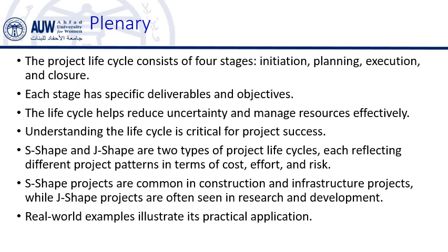Understanding the differences between the S-shape and J-shape life cycle helps project managers decide how to allocate resources, plan the timeline, and manage cost based on the nature of the project. For example, a project manager overseeing the construction of a new office building needs to focus resources on the execution phase, while a project manager overseeing the launch of a new product might expect a high initial investment, a quieter middle phase, and a final surge of activities.